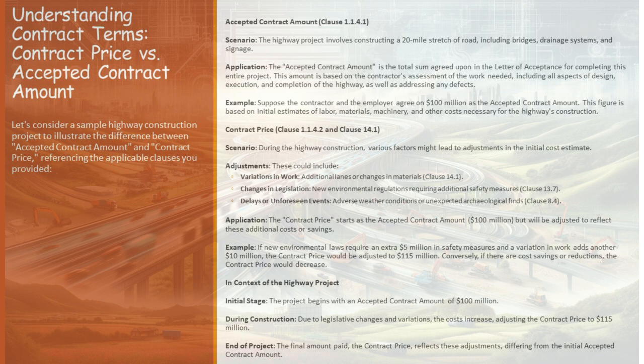Next, we encounter changes in legislation. Construction projects don't exist in a vacuum — they are subject to the laws of the land. Imagine, a few months into our project, new environmental regulations come into effect. These regulations mandate additional safety measures to protect nearby wetlands. Compliance is not optional, and it's not free. The contractor now faces extra costs for environmental barriers and specialized equipment. This legislative change adds $5 million to our project. Our contract price climbs to $115 million.